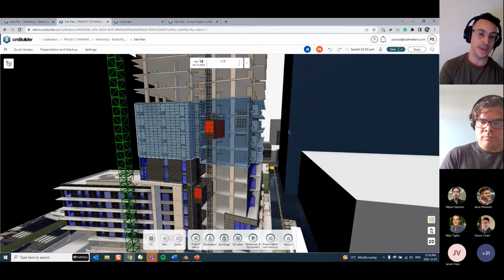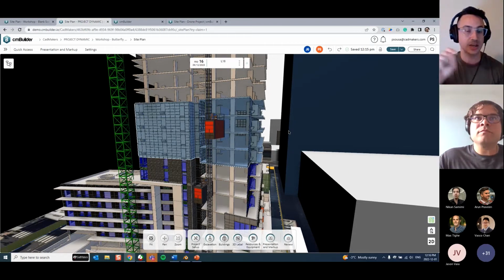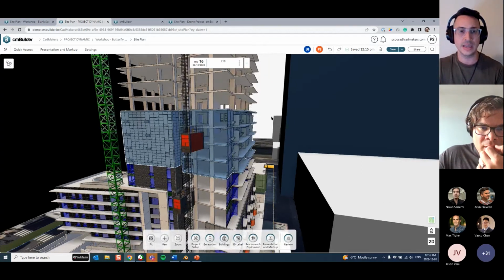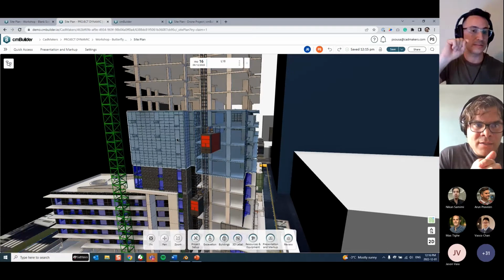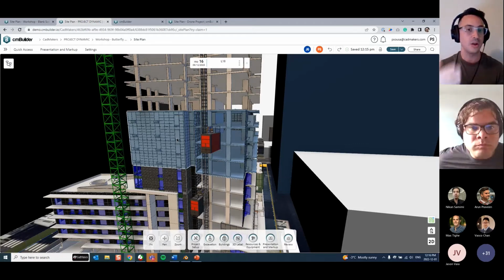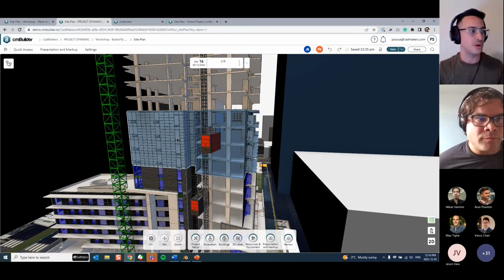One of our main updates coming in the following weeks is the connection of these selections to a specific milestone. So I believe in a couple of weeks, instead of defining our sequence by hiding and showing elements on milestones, we're going to actually assign these objects, these parts, to a milestone directly. And there will be a color code telling you which parts you have selected and assigned already, which parts you haven't, which ones are in the future, and which ones are in the past.